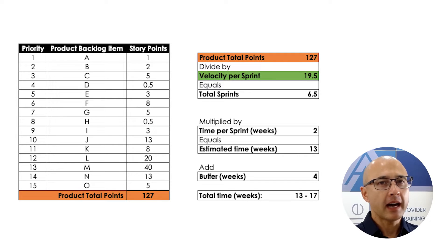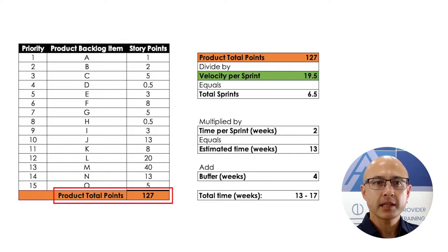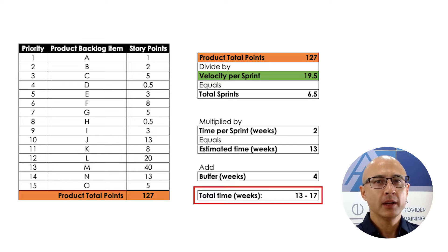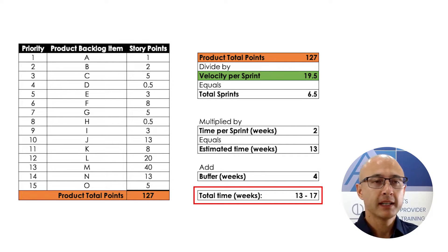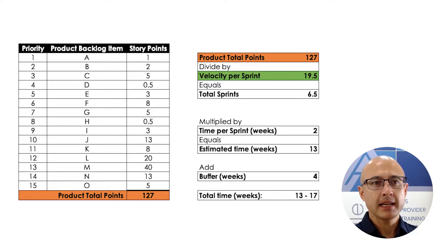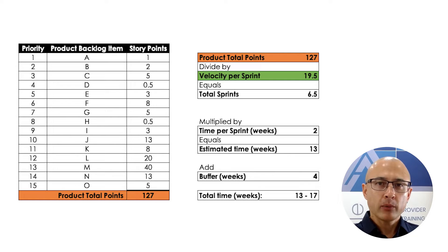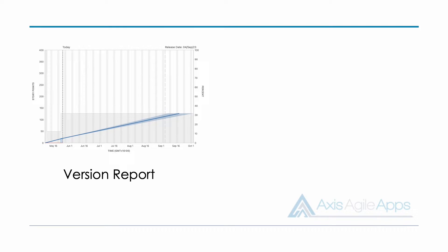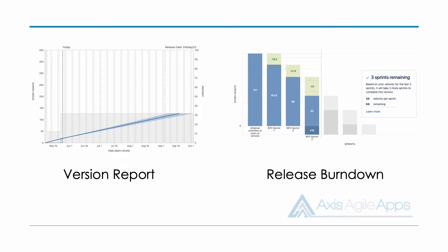In the previous video I gave this example: I had A through to O, a total of 127 points, and it came out to be a forecast of about 13 to 17 weeks based on a velocity of 19.5. So let's imagine my team starts this release and starts delivering these product backlog items — how can we track how they're progressing? Well in Jira we have two reports: the version report and the release burndown report.